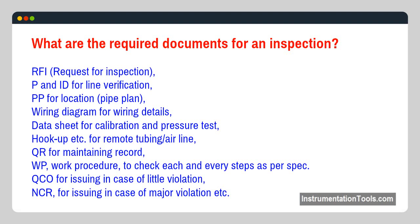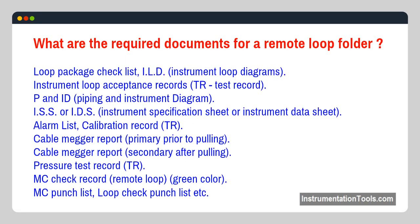What are the required documents for a remote loop folder? Loop package checklist, ILD (instrument loop diagrams), instrument loop acceptance records, TR (test record), P&ID (piping and instrument diagram), ISS or IDS (instrument specification sheet or instrument data sheet), alarm list, calibration record TR, cable mega report — primary (prior to pulling) — cable mega report — secondary (after pulling) — pressure test record TR, MC check record (remote loop, green color), MC punch list, loop check punch list, etc.